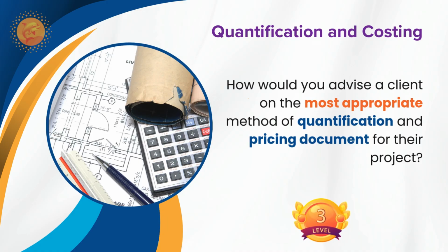Yes. These are all very good examples. Joshi, you added the elements you analyze, but here the important thing is what you want to advise. That is the thing. The quantification, how do you do it? You need to mention the standard method of measurement, and again you have to relate it to the contract form, how you are going to utilize it, whether it is remeasured or lump sum, or what sort of things are there when you are going for quantification.